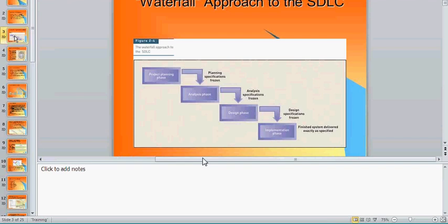If yes, then what is the impact? 2 weeks, 3 weeks, you will add that time or that amount to your budget and say, all right, so my new project delivery date is going to be such and such. So going forward, you will not be evaluated against the old timeline, but you will be evaluated against the new one. There is a reset. All right, so that is one variation.